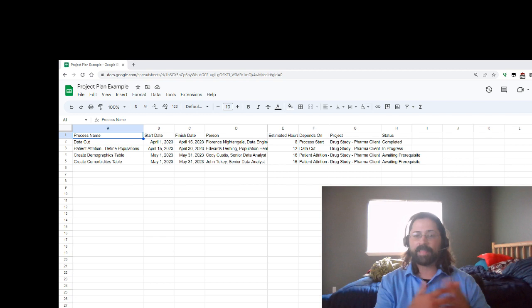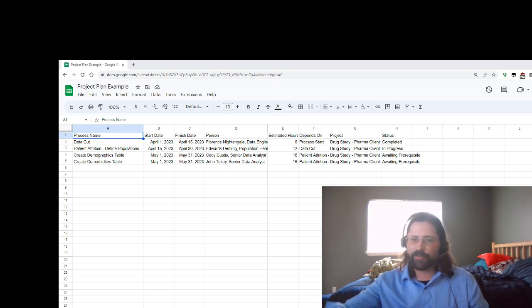So understanding that is very handy in terms of trying to break things down, because if steps can be done in parallel, more effort means you can do things at the same time. But if they're sequential steps, if you have to have one person do something and then another person, adding more people onto a project doesn't necessarily speed things up. So that's a very important breakdown consideration.